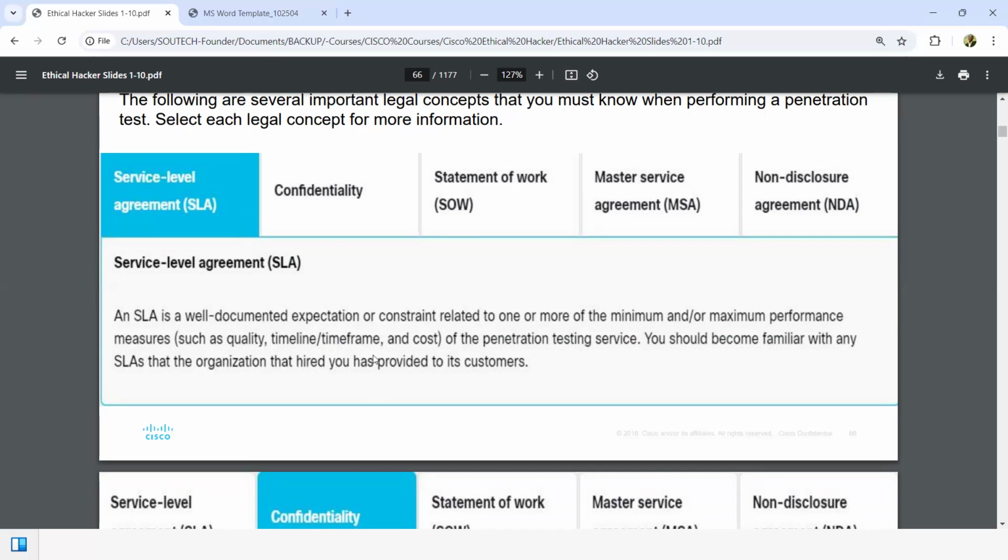If we say this pen testing is going to last for 30 days, once you are still testing after 30 days, you are going against our SLA, right? And we might have issues. We might be sued, we might have deductions in our amount. We might imagine we have a framework, a timeline for running this pen testing, and everything is on hold for that purpose. By the time you're extending after 30 days, you're going to have quite a lot of issues. You might have downtime, all of that.